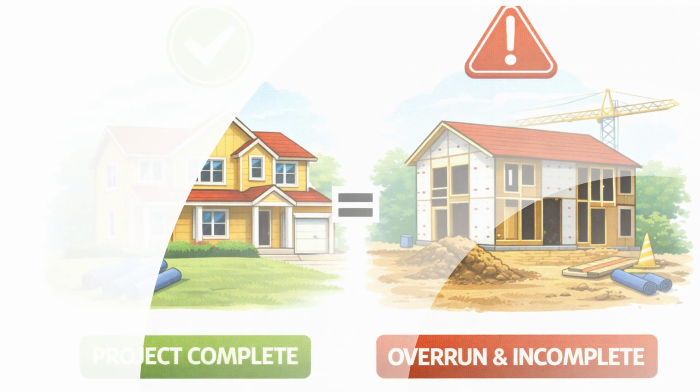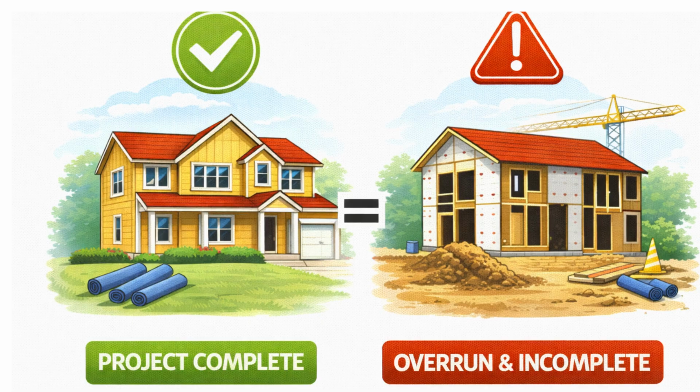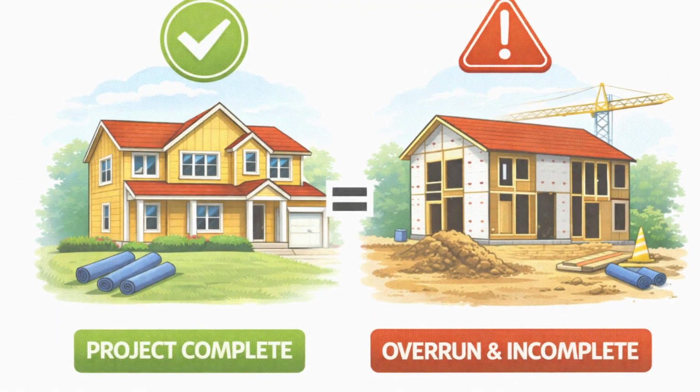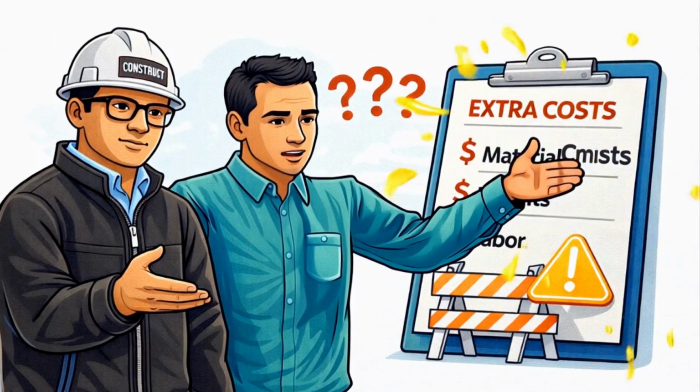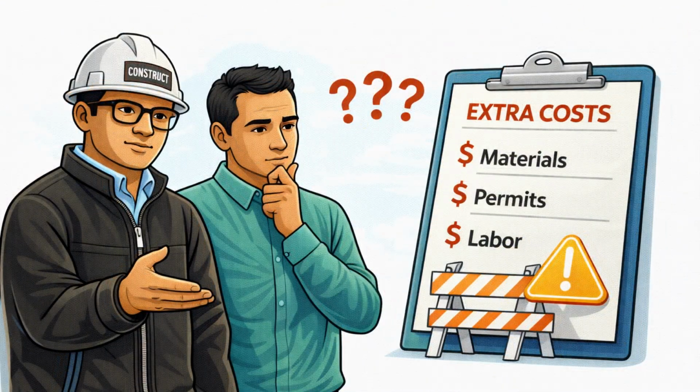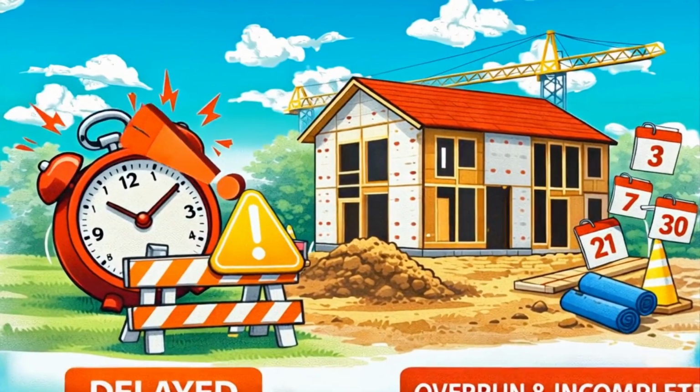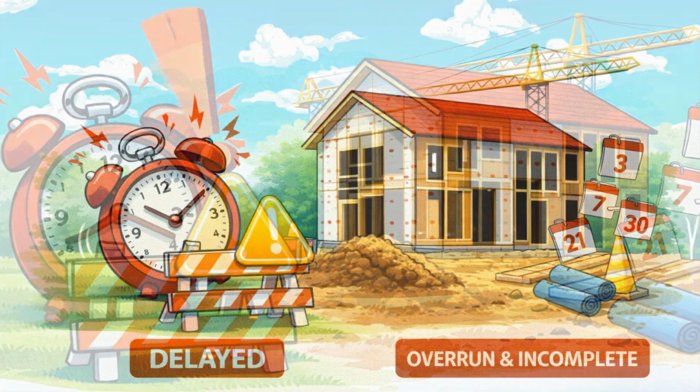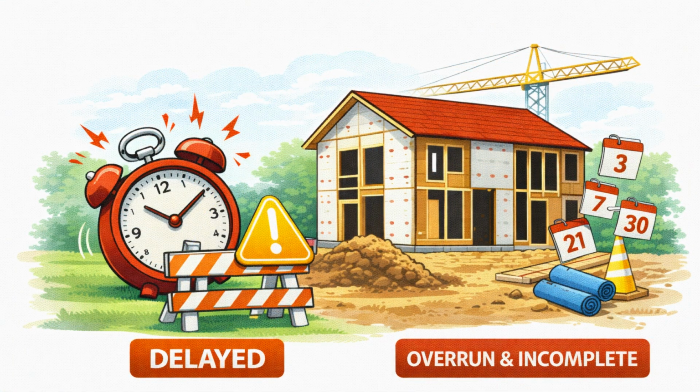Construction is emotional. You're building identity, family legacy, future security. That's why small changes feel justified. But construction is physics and sequencing. The most dangerous phrase is, "It's just a small change." There is no small change in a complex system. A small change can force structural recalculation, rerouting plumbing, rerouting electrical, redoing formwork, redoing finishes. Smart builders are not the ones with the best taste. They're the ones with the best controls.